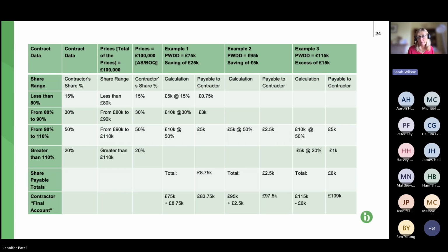Contractors, when they're tendering for works, don't often get a chance to provide detailed targets, etc. And also, of course, it's effectively capping the contract. So in some ways, it's arguable that the contractor's getting the worst of both worlds. It's not getting a fixed price where it might have the opportunity to make a lot of profit on a project, but it's not getting a proper pain gain sharing contract. So that's just something to think about, and a trend that we are seeing quite a lot.